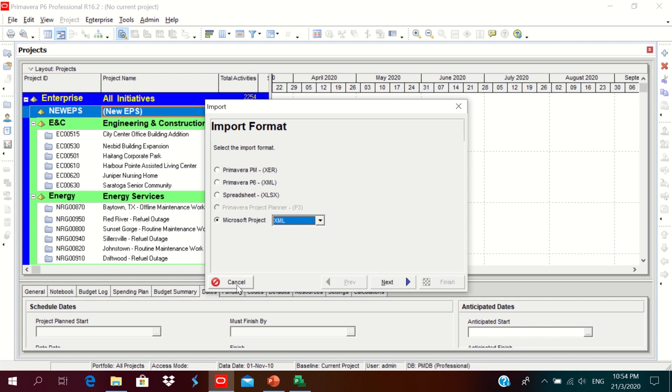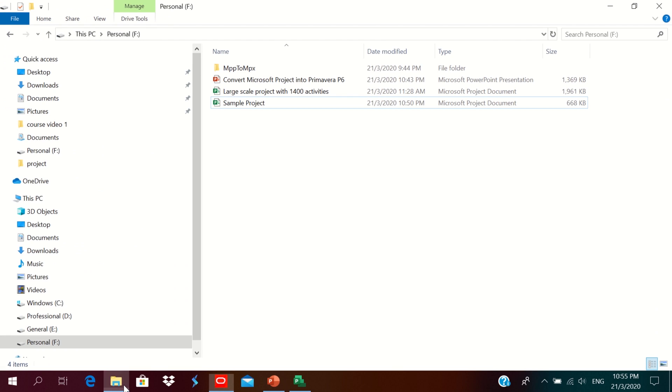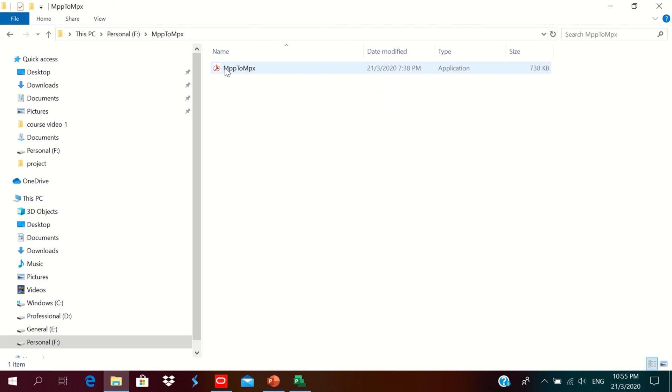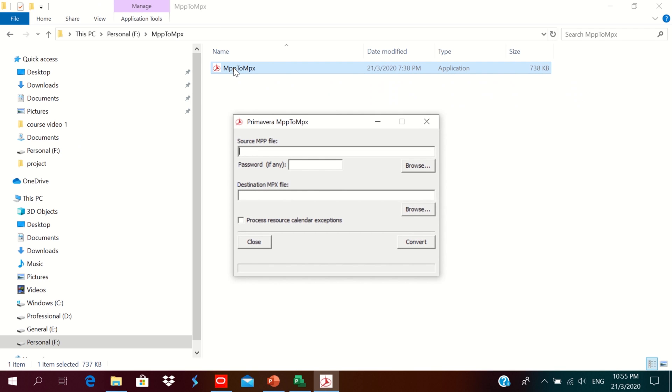So we will use the converter to do that process. Go back to the folder, go to the MPP to MPX converter, click on it, double-click on it, choose the source file.